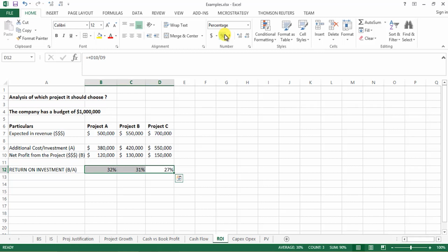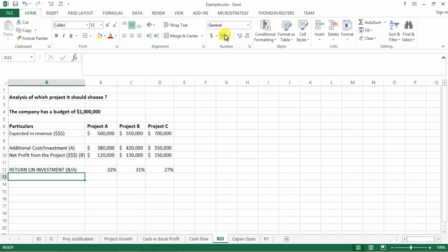And mark this, all companies have an internal predefined return on their investment. Let's say your project generates a 5% return on investment and government bonds give a risk-free return of 7%. In that case, companies won't even consider your project. They'll directly put the funds they could allocate to your project in the government bond, because those are risk-free investments guaranteed to generate a 7% return, compared to your project which is only generating 5%, in terms of financial policies. So that was all with regard to the importance of ROI, return on investment.